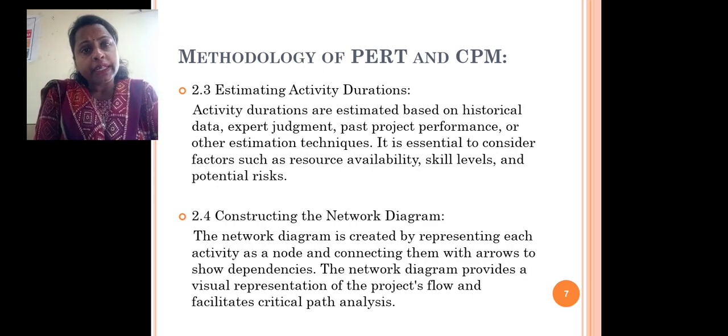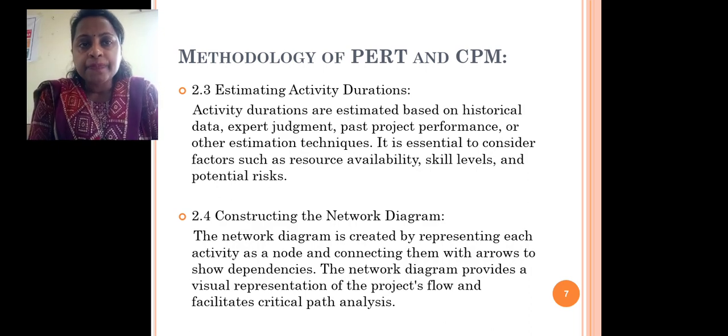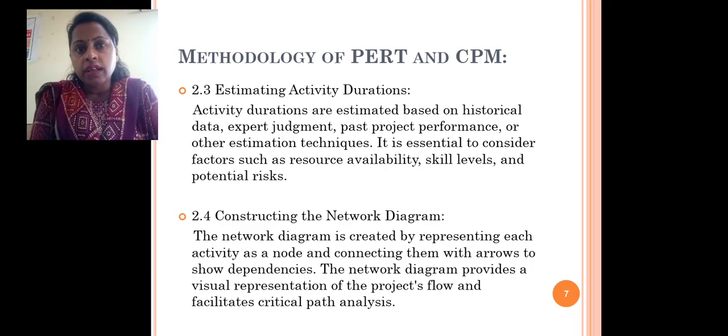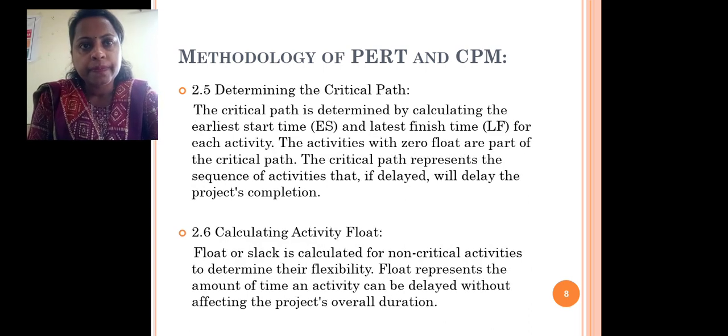Now, the fourth point is constructing the network diagram. The network diagram is created by representing each activity as a node and connecting them with arrows to show dependencies. The network diagram provides a visual picture or representation of the project flow and facilitates critical path analysis.